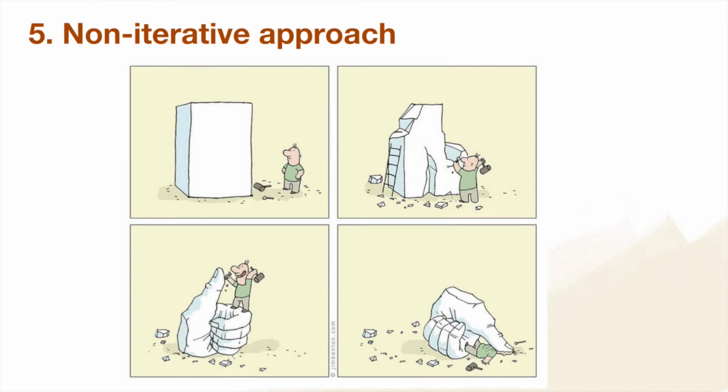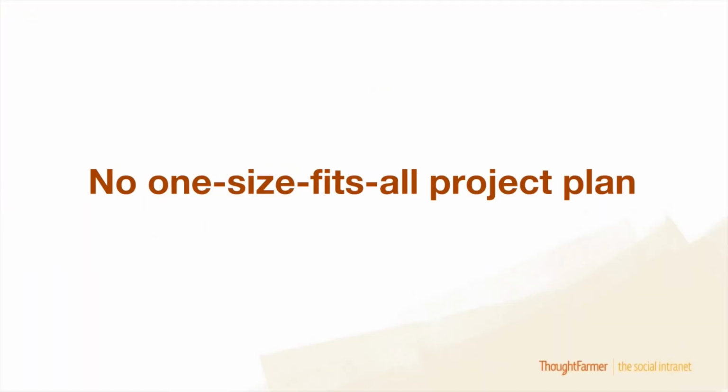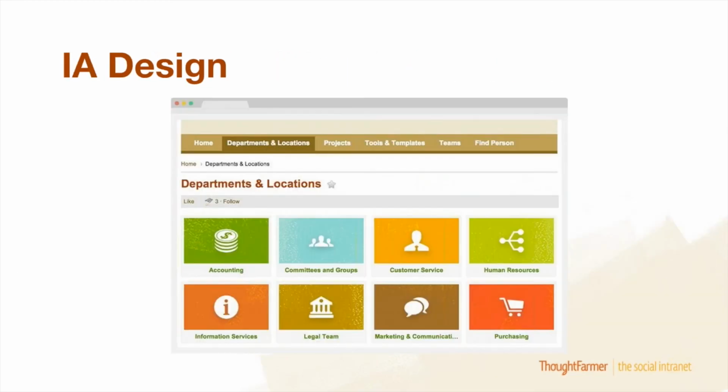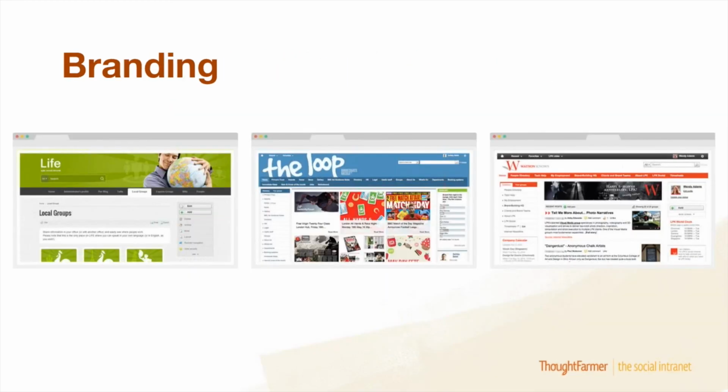Perfect. Thanks so much, Caroline. And I know we're running a little bit towards the end of our time here. Just in regards to content migration, I'll add one final note because that seems to be, as you mentioned, the largest task. We do have a content inventory worksheet available on our website as well. The key with that is really looking at how much you can reduce and how much content is out of date or redundant, and the big tip there is looking at what content you can get rid of and what content you don't need.